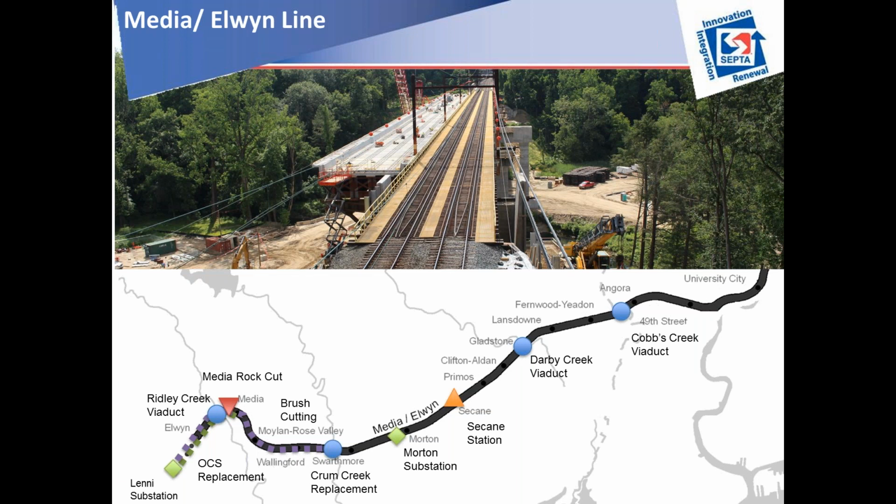And talk a little bit more, we do a lot of these corridor type approaches in the summer. There are times when we have to shut down a line to do what we call a bus bridge. We tend to do those in the summer because in the summer we gain about 100 vehicles back into the fleet because we're not running the school trips. We go through an extensive planning process to develop where the work crews will be. And this helps us 2 ways. One is that we get better project data right out of the field when we are replacing the assets. We know who is doing what and where and what is getting changed or reconfigured on a day-to-day basis.